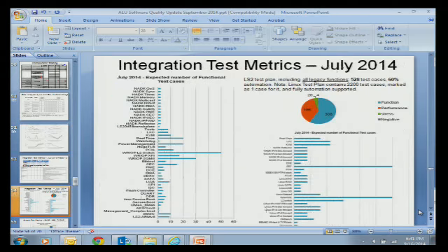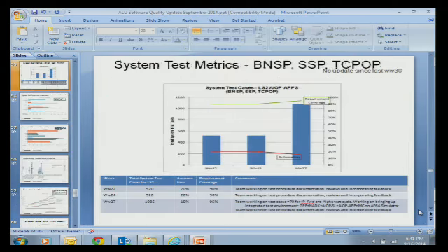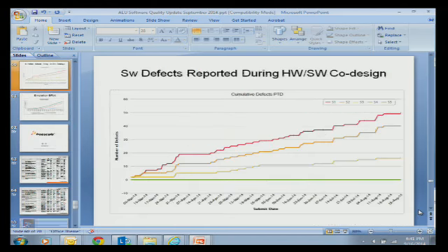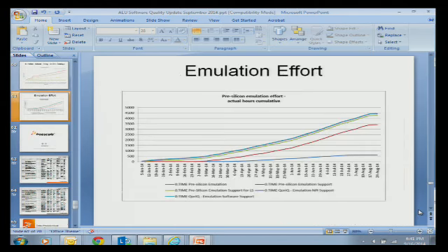Okay, all this data, we haven't even put the first release out yet, but the reason you collect this information is you try to manage the process in real time. So you don't wait to the end of a 2-year project and then determine whether your process was right. You collect data every step of the way.